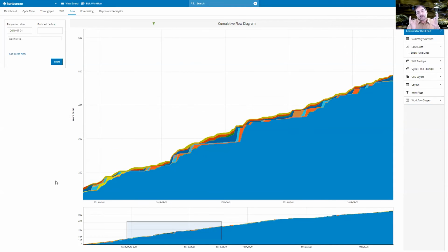Another typical thing we might see on a CFD is steps, like here, which clearly shows us batching. In this case, as it's a development team, there have been deployment cycles, but we can ask questions. For example, here we can see it's 7 days in between. Here it's 21 days. And with that, also the average time became 18 days. Why? What happened there? If it is known, great. If not, we can manage it.